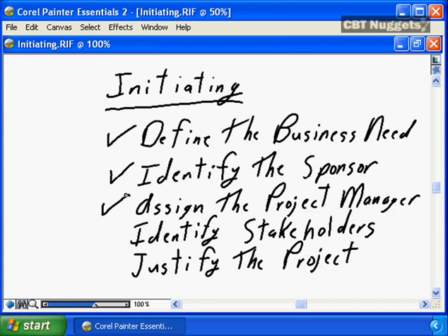The project is initiated, the project charter is prepared, presented to senior management in a series of time. It may be weeks, it may be months within the organization before the project is officially approved and we go into the planning process. So often the project manager involved with initiation has gone on to other projects, and a new project manager is assigned to carry on and fulfill the project. Acceptable, but not ideal. Ideally, a project manager is assigned during initiation, and that project manager carries that project through to final termination.